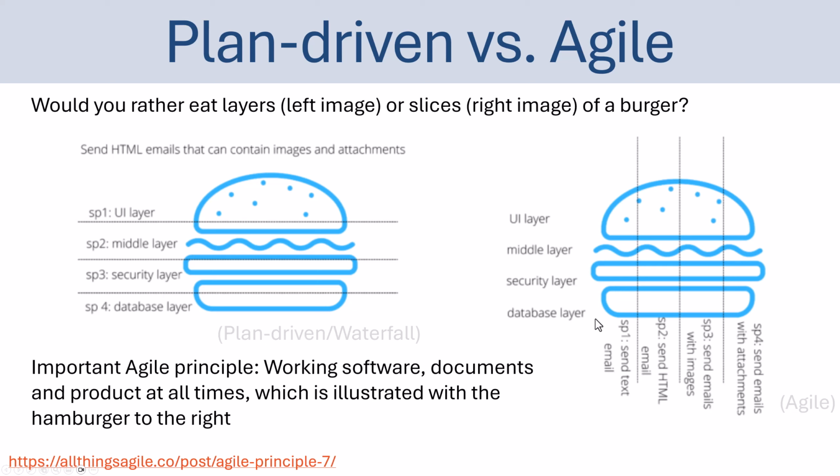But in this more flexible and newer approach, this Agile or Scrum, you do all the different topics in each sprint or in each iteration. So typically, you select some important part in your application that you want to implement, then you document that part, you test and install that part, and then when that sprint or iteration is finished, you show the result to your customer, and then you discuss that part with the customer.